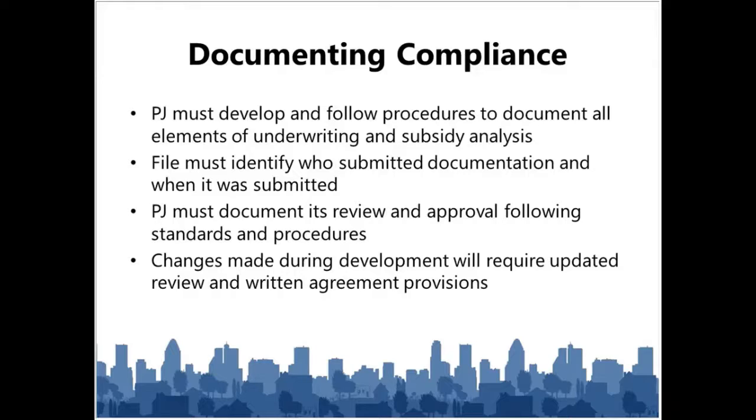So you need to have a file that shows that you got the documentation, that you went through your analysis, and to be able to document that to show that you did your due diligence. And keep in mind, there may be changes throughout that development period where maybe they identified some additional fire suppression, or something happens where there are additional costs.